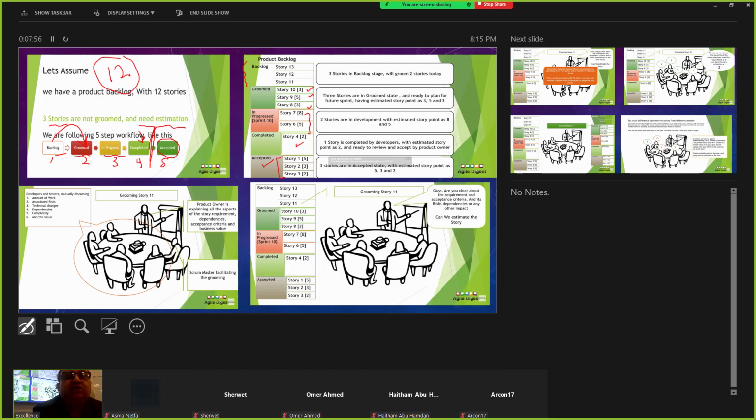If you see the numbers in front of the stories, 3, 5, 3, these are from the Fibonacci formula. Okay, so these are basically only for reference. You can use 3, 5, 8, any numbers from that, because it means that 5 is more difficult than 3, and it has more tasks than 3. It is a weighting or rating for, let's say, the complexity of that user story or feature that you're doing. Okay, how complex is it? 5 means it's more complex. 13, done, because, for example, in our organization, the maximum is 30.